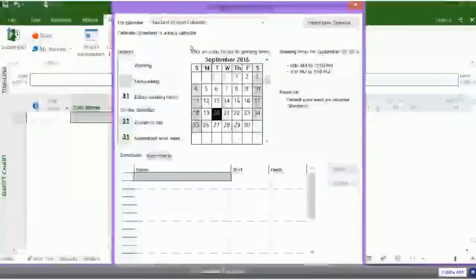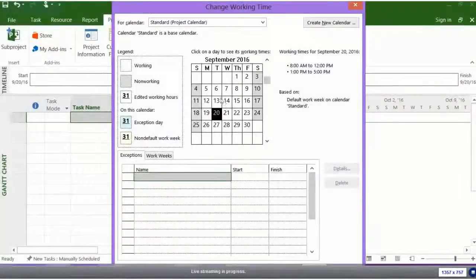What is my inventory of availability for my resources? That inventory is defined by the project calendar. Okay, so if I were to mark out tomorrow as a holiday, because it's a holiday in whatever country you're in, the scheduling engine would skip over that date.